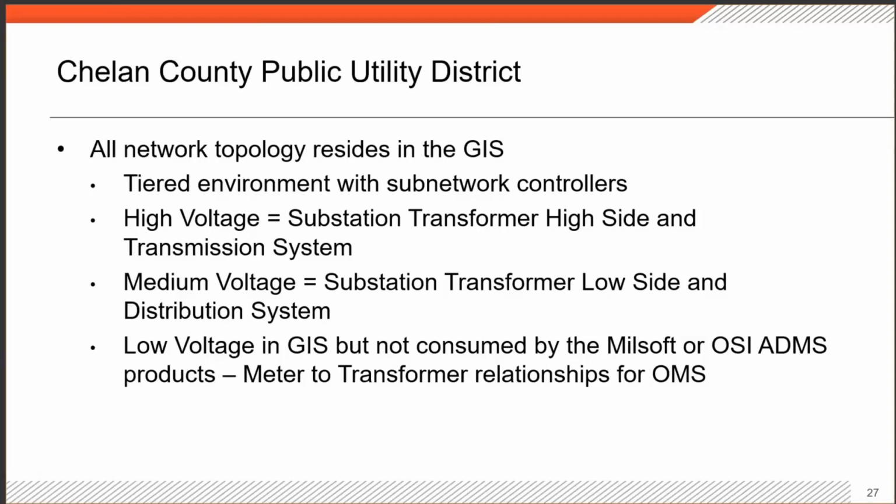It didn't turn out to be that big of a job for the substations. We had one GIS editor working on remodeling our 50 substations, and it only took them about 100 hours. He's a real experienced editor, so it helped to have somebody with that knowledge.